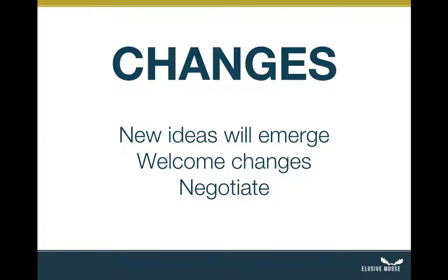We're going to prioritize them and determine if they're critical now. And if they're not, the first thing I might do is just say, let's phase that. Let's push that out. We'll do that at another time. We'll keep the idea. It's a great idea. Let's move it to a later date, not within the scope of this particular project.